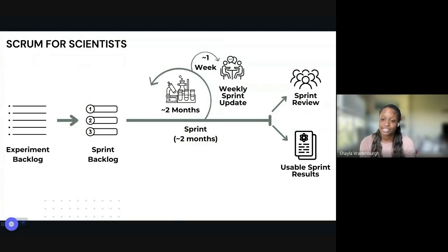Then once your sprint is completed, you'll do a sprint review, which is when you share with as many people as possible what you accomplished during your sprint, any barriers or struggles that you had while completing your sprint, and what you plan to do for the upcoming sprint.